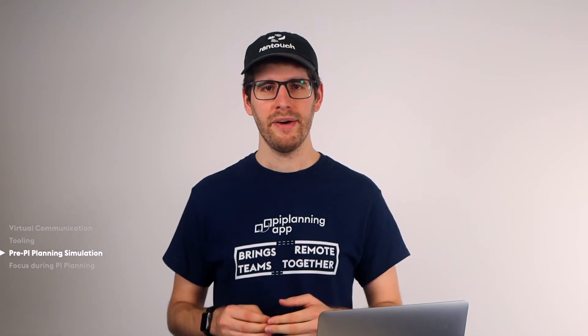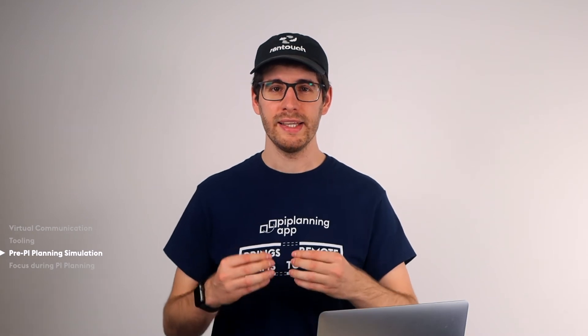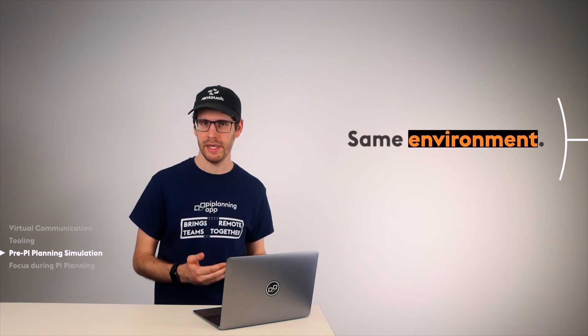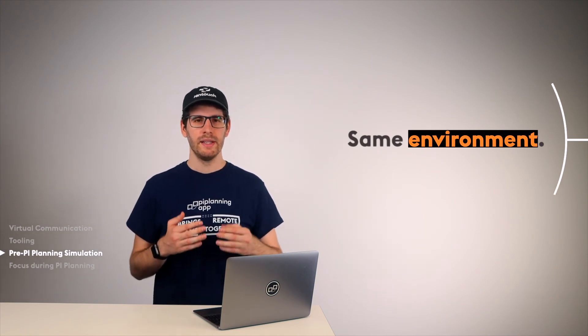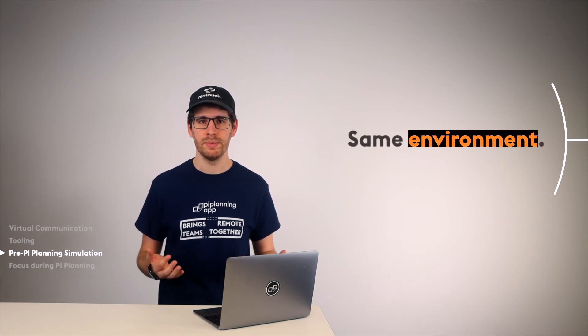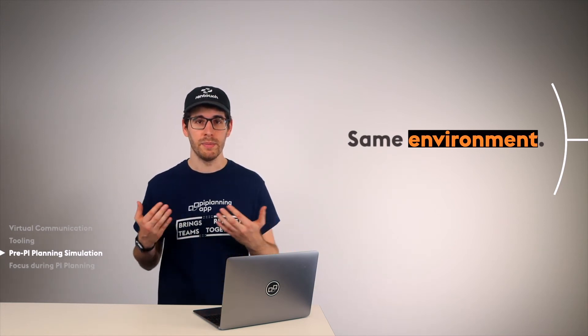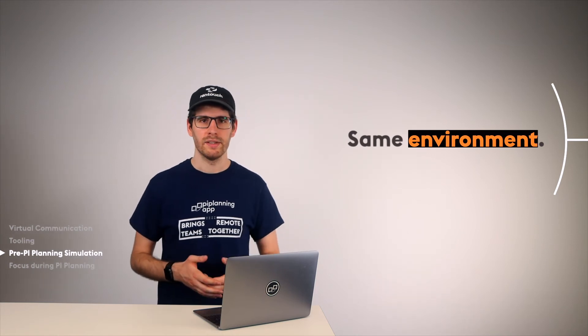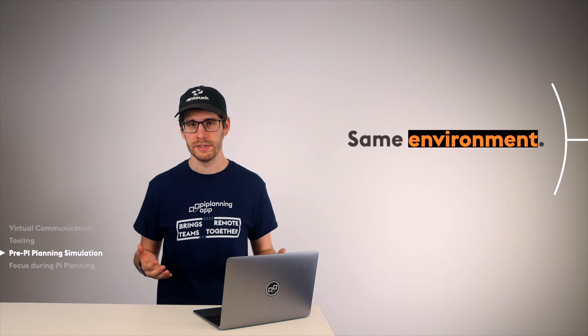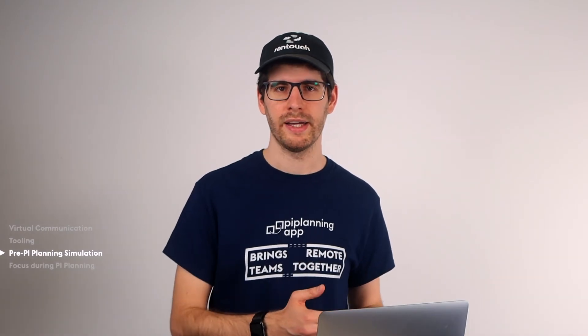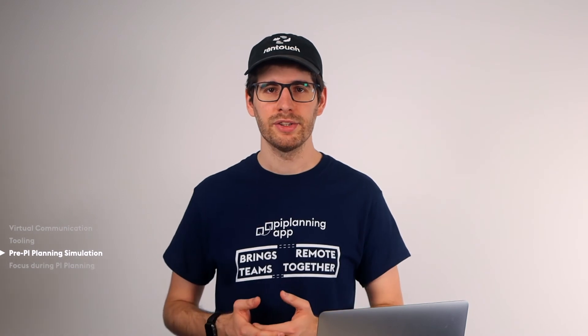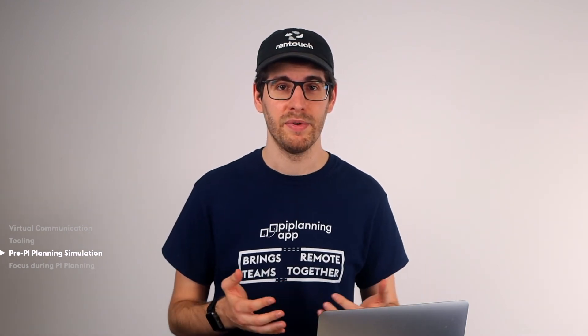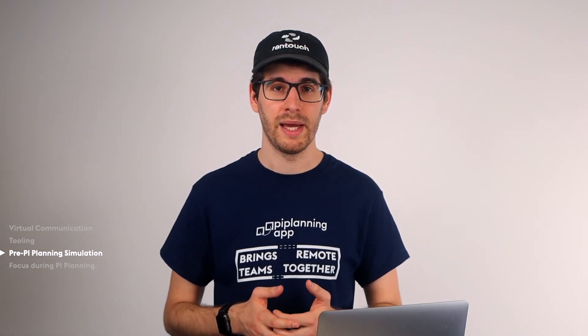When preparing this simulation, it is important that we create exactly the same starting point as it will be in the real PI Planning. This means, let's assume we use Webex in our company. All participants join via Webex from where they will be in real PI Planning. For example, their desk at home, a co-working space, or the office. This way, we can make sure that everyone knows how to connect, if their internet connection is stable enough, and to minimize the risk of having to run a software update on their WebEx right before they want to join the real PI Planning.